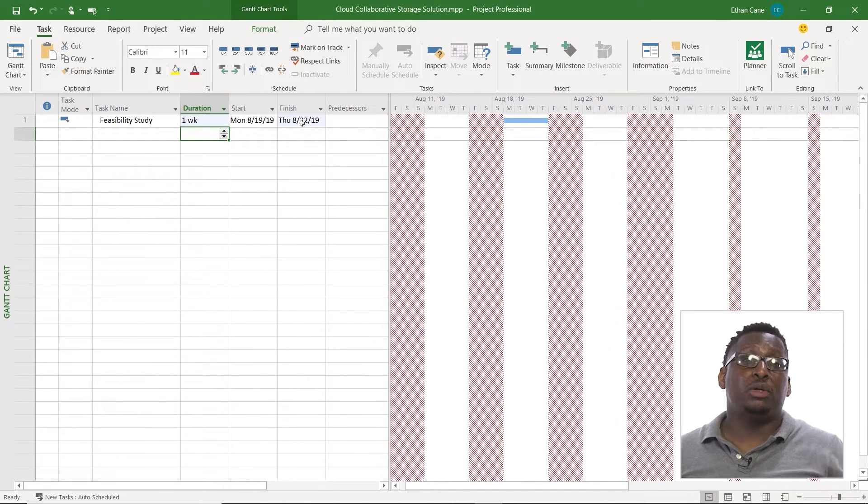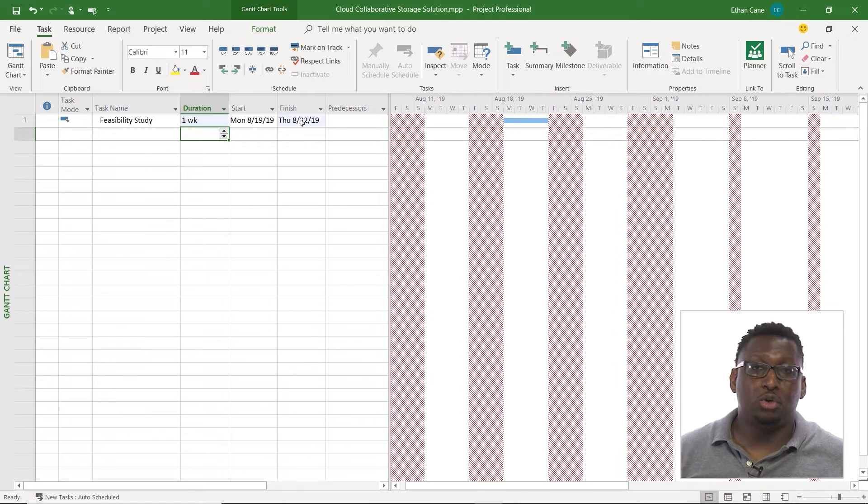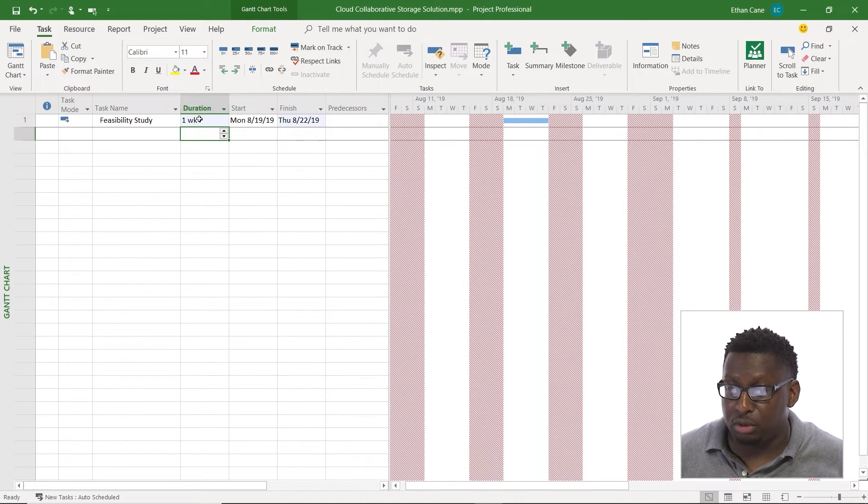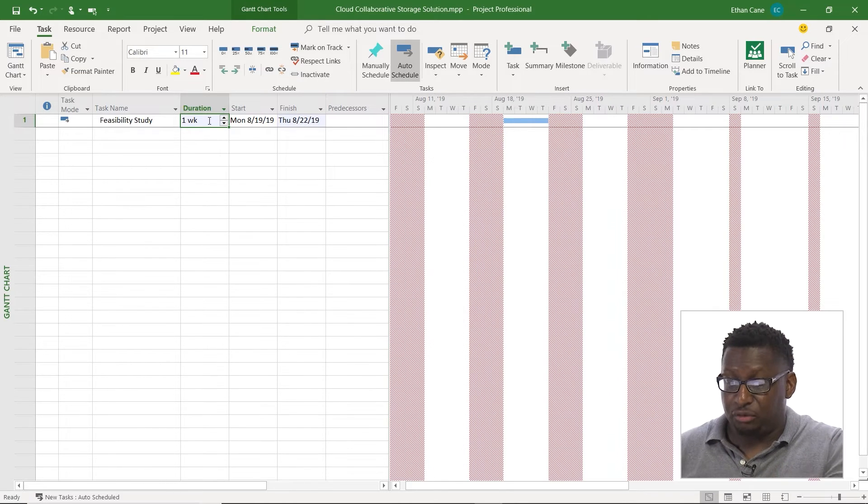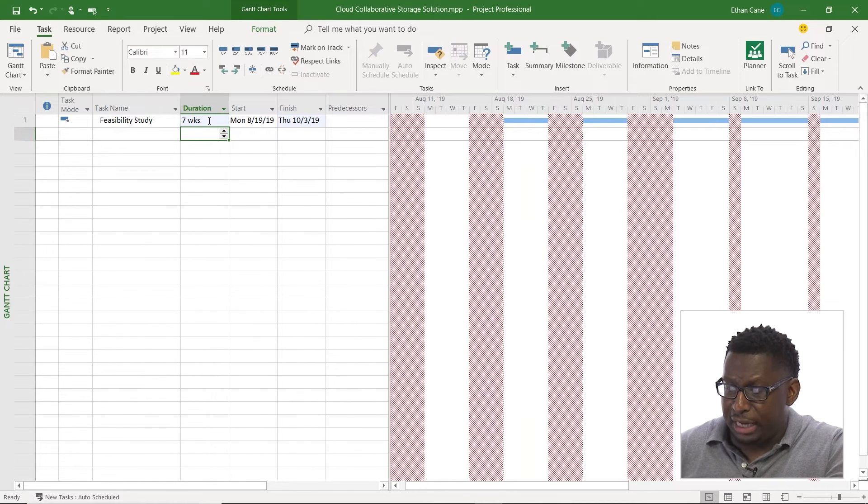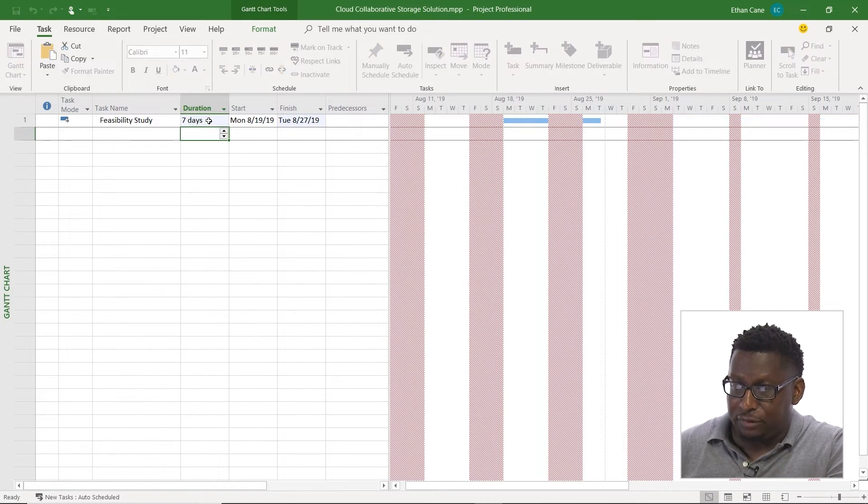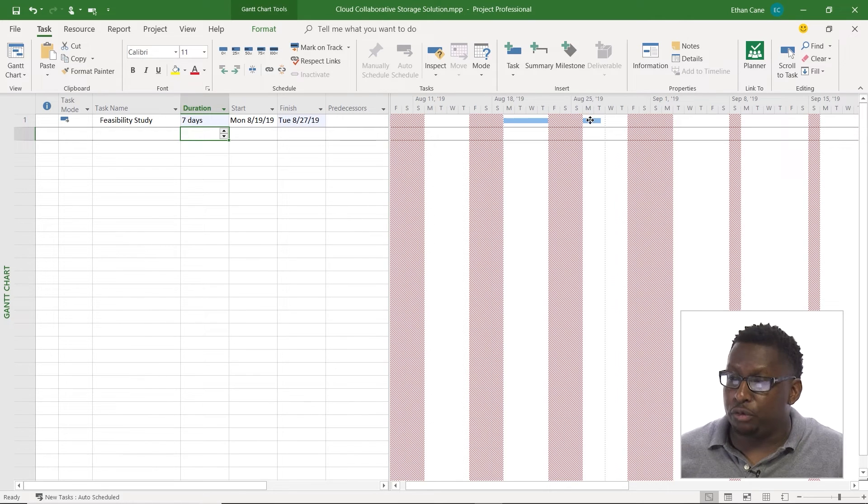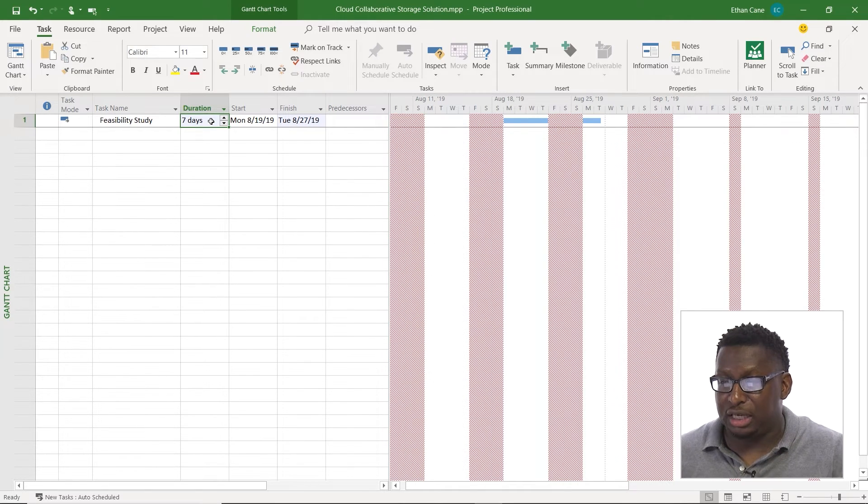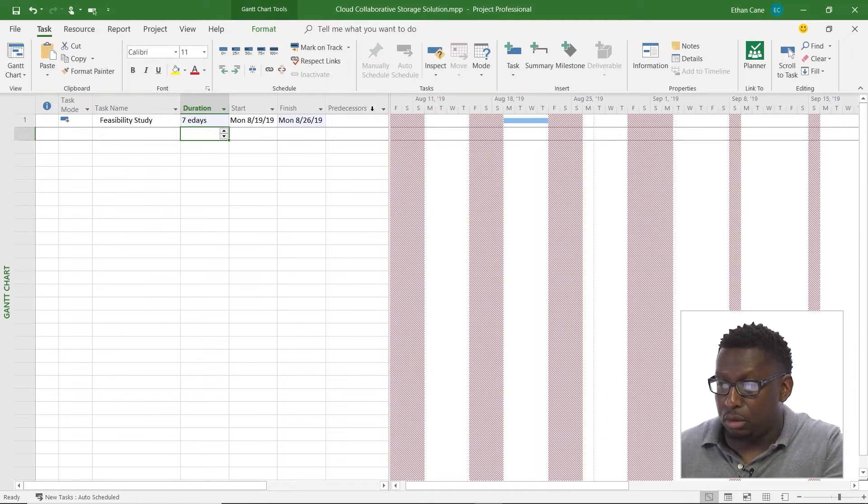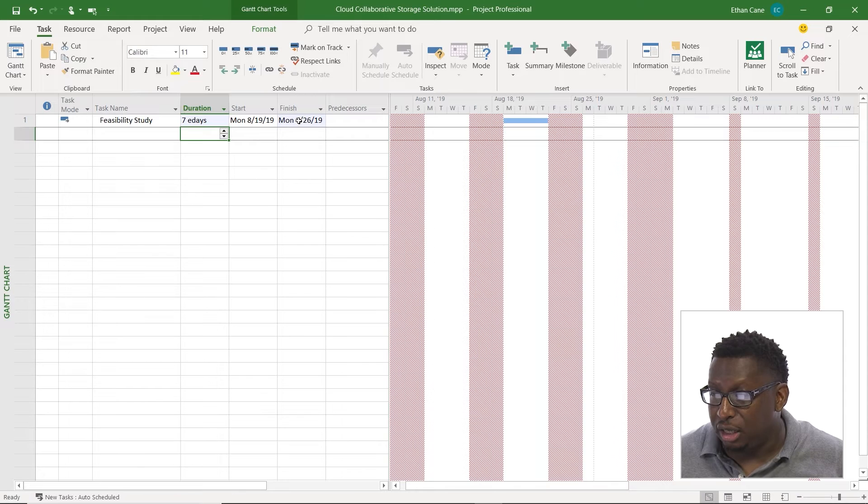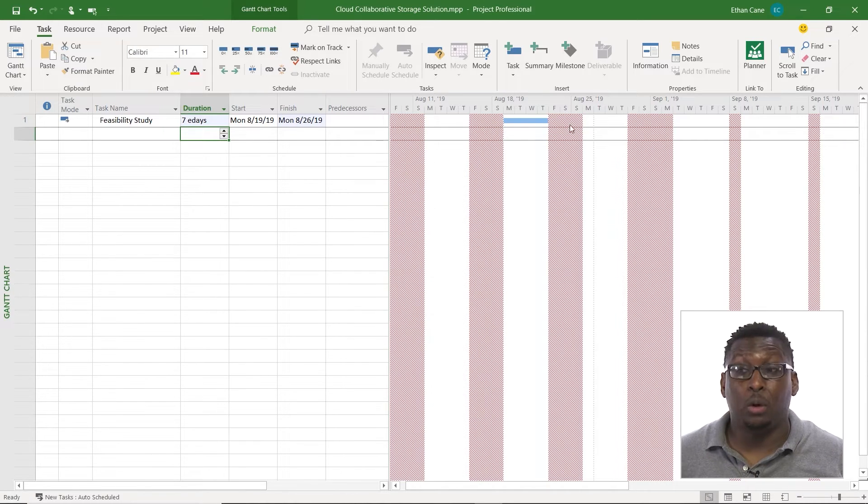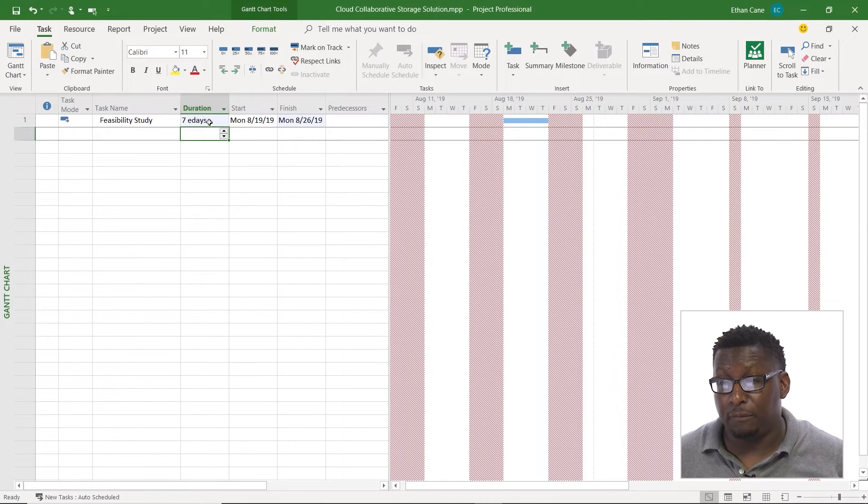If I wanted to switch it from work days, work weeks to calendar days or weeks, I would say, let's do days first. So here we had, let's switch it back to days, seven days. It's spilling over here. I'm going to change that to seven E days. Notice it switches. Now the finish date is finishing on the 26th as opposed to it doing work days so it's spilling over into these other days here.